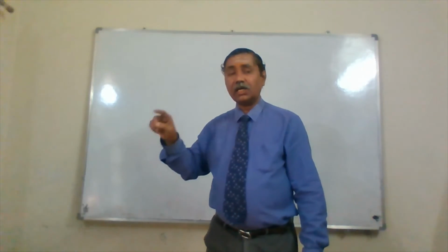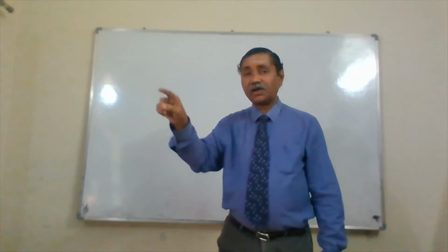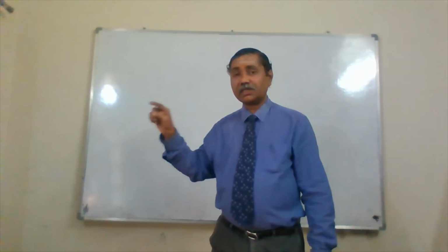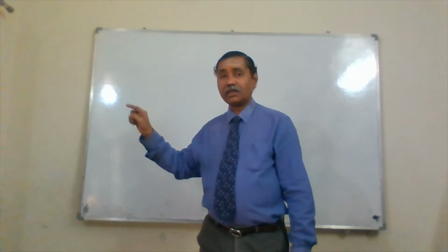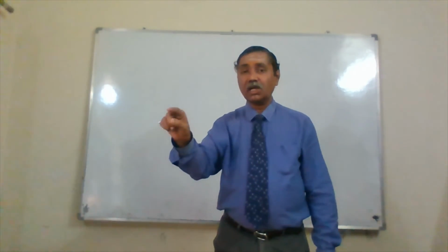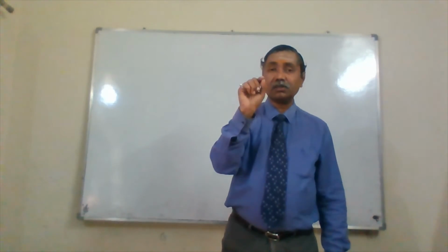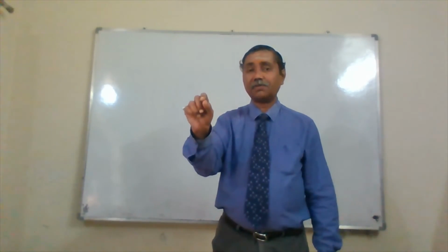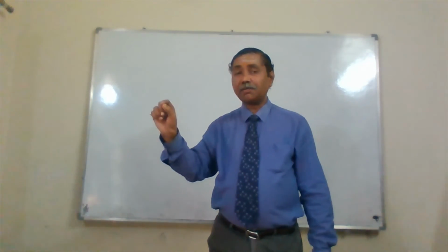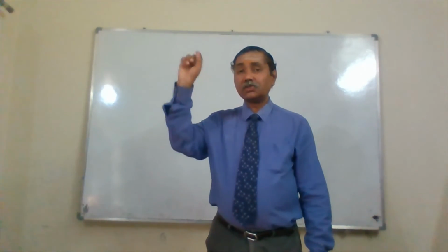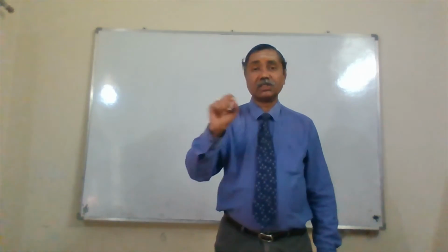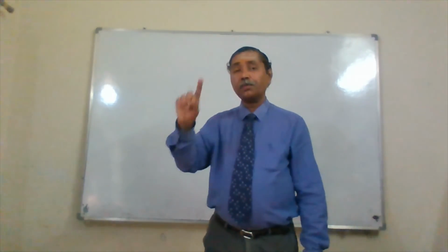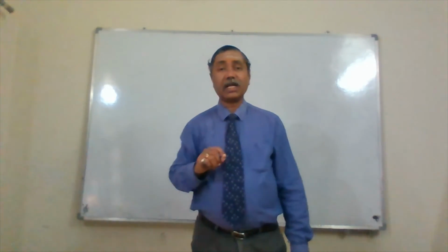At the intersection of the lines, team members from different business functions, HR function, finance function, operations function, like this, will form a team under a specific project manager, and each team member reports to two people. One is the functional head, and the other is the project manager. They have to report to two people in a matrix-oriented organization structure.